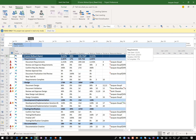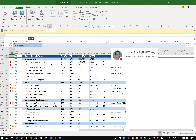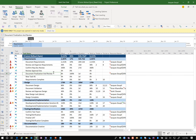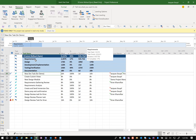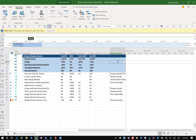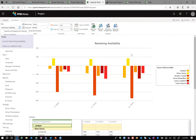Why would we use this? If you're not doing resource assignment at the detail task level and just want to assign at the phase or project level, you don't have to specify 'analyst at 50% for 20 or 30 tasks.' You can use engagements across the entire project — for example, 'on this project I need 20% or 50% of this role.' It's helpful, saves time, and gives you that overall availability and capacity view across the organization.